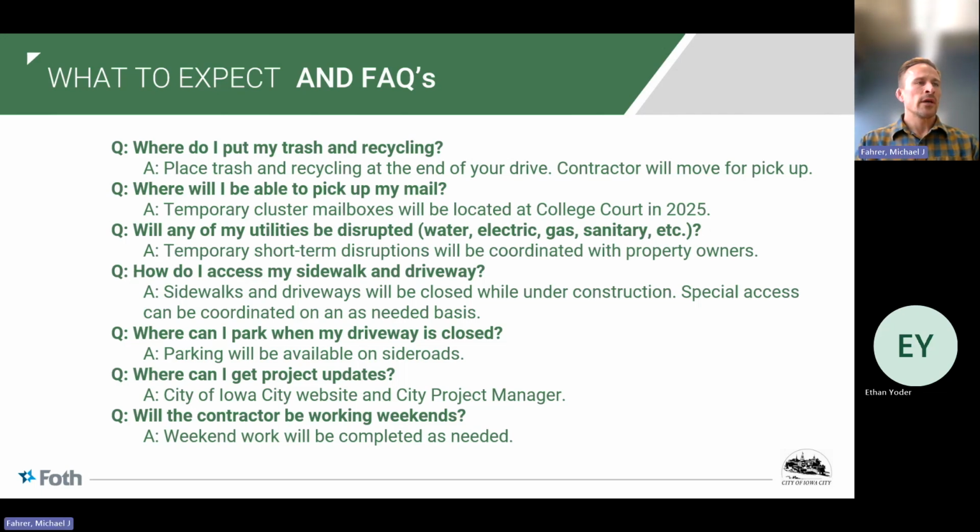Next question here, will any of my utilities be disrupted, such as water, electric, gas, sanitary? So there will be temporary short-term disruptions. Those will be communicated to each property owner. For example, when the contractor gets the new water main installed, they'll install the new water main, test it, and prior to them cutting your existing service over to the new main, they will coordinate with you just to make sure for that short duration when they have that downtime that will work for your schedule.